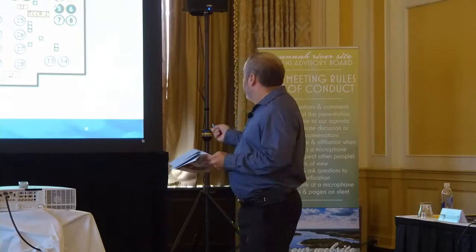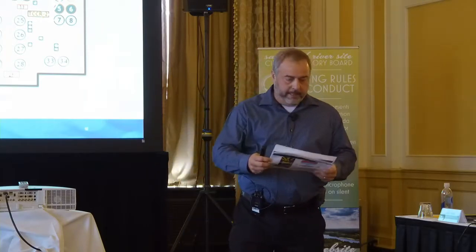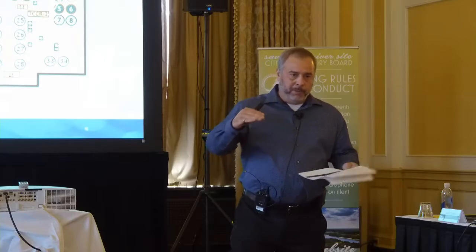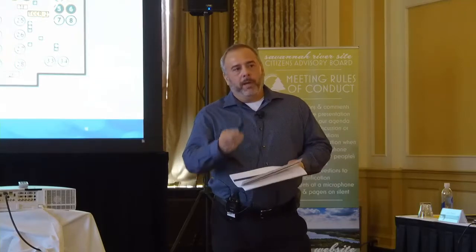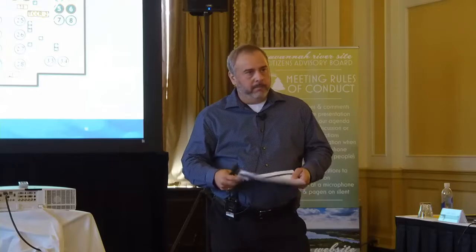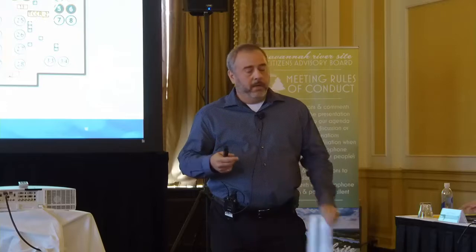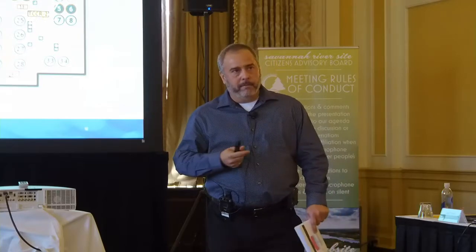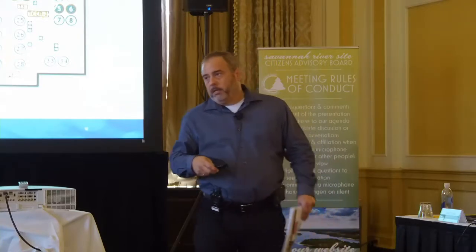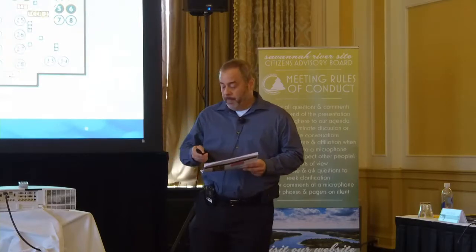over by those initial 8 tanks, 1 through 8. This is, once again, if it's feasible to do so, okay, I don't want to get ahead of myself, but if it's feasible to do so, we have another milestone commitment to the state that says we will deliver a processing plan for that particular unit number 2 by May of 2022. Okay, so we have almost 3 years till that one would come due.